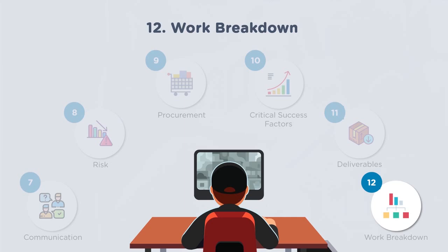So every product or service should be broken down into multiple pieces. I'm not saying go and break that product. I'm saying that a product will have multiple components involved, and those need to be segregated. For example, car exteriors and car interiors. Car exteriors are the external items you can see: body structure, mirror assembly, headlights, then tires. Whatever I can visualize, I will make it a line item under the exterior.